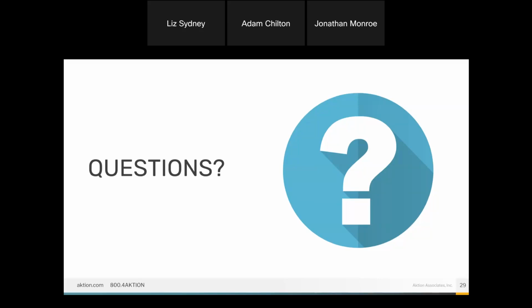No, they're available. Once you check out the plan, that's what gives you the ability to add dependencies to the schedule. So yes, it is part of 5.5. There's nothing to enable in settings or anything like that. It's already there. The only catch is you have to check out the plan. You have to be able to modify the plan to be able to add them.